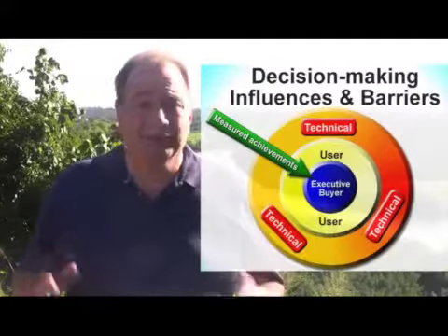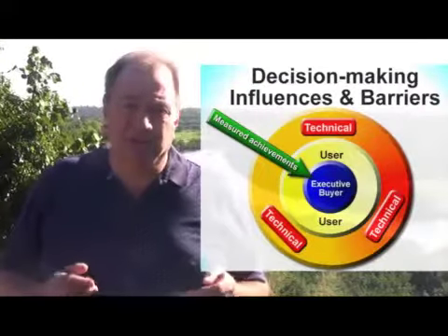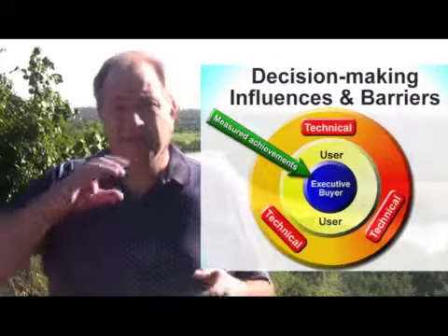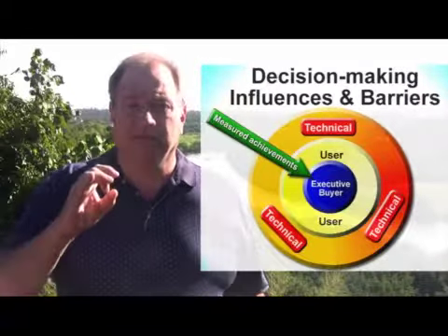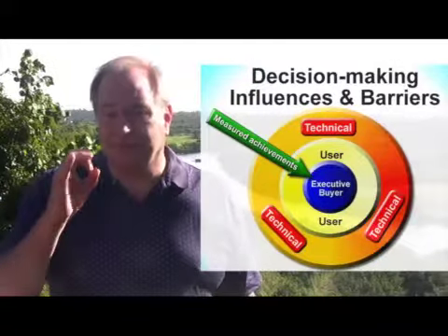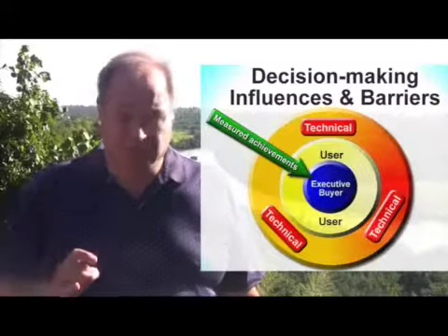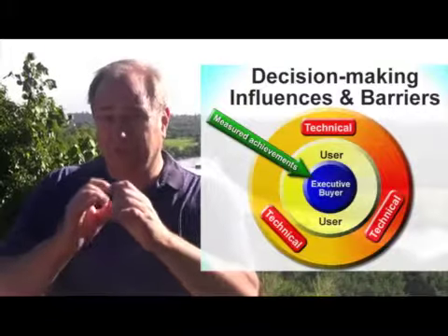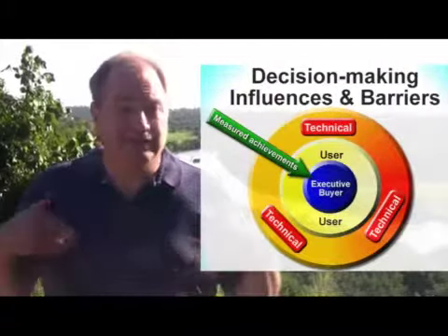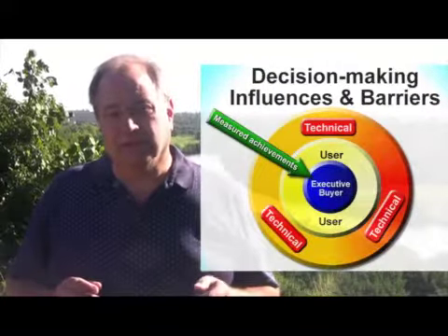The first thing we have to do to improve this position is to figure out who the decision makers are. Now, this executive we're talking to is certainly presenting him or herself as the executive buyer, the one who's going to buy this project, possibly sell it in the organization, the one who's going to give you the go-ahead on the project. That's just one of the decision makers we have to be aware of, though. And of course, there can be more than one executive who is the buyer. We need to very carefully identify who's in that central decision maker role.